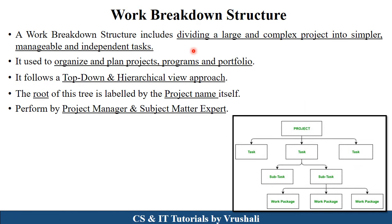The first thing is: what is WBS? WBS stands for Work Breakdown Structure. This structure is generated in the planning phase of the software development life cycle and is performed by the project manager and subject matter expert. In the software development life cycle, a designer designs a particular product module by module, and a developer also develops a product module by module. For that purpose, work breakdown structure is necessary. WBS divides a large and complex project into simple, manageable, and independent tasks. It is used to organize and plan your complete project into different activities, sub-activities, and the complete status of the overall project. As seen in this diagram, WBS structure is always shown in a hierarchical manner or tree-like structure.